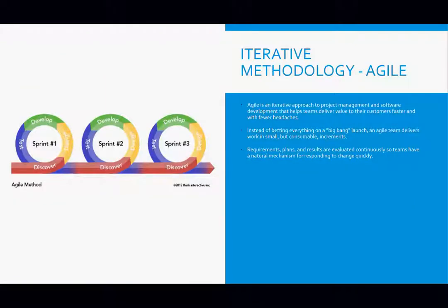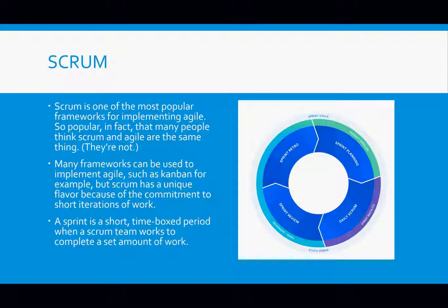But in Agile, it's totally different. You have less documentation, so to say. Because of that, you tend to collaborate more with developers, and also you tend to see changes more quickly. As you can see from this diagram, in a cycle, a requirement comes in. You do the design, or the BA does the design, and it's developed, and they test quickly. So that cycle of sprint one goes for each of the products, or even an item that is in the sprint. After everything in the sprint has finished, that is released to the user, and you move to another sprint, and you go on like that, cycle after cycle.